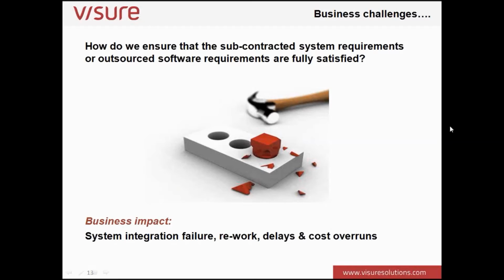The benefit of that is, one, it validates whether the requirement you placed upon them is measurable. That's pretty useful. And number two, by giving them the information on how you expect to verify and test that they are compliant or that they've delivered against that requirement, you're giving yourself a second opportunity to fully explain what you mean by that requirement. It's a further opportunity to tease out any ambiguity or any interpretation that could occur on that requirement. By actually linking that requirement to its associated test and giving both those bits of information to your outsourced or subcontracted entity, it gives them no room to interpret or misinterpret or reinterpret what you originally asked them.